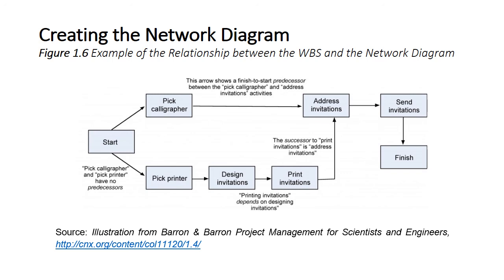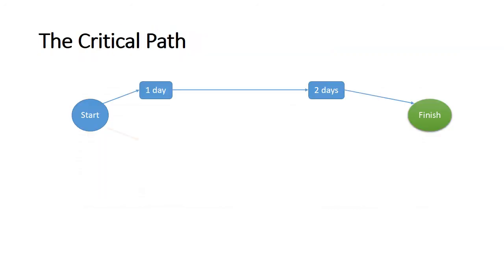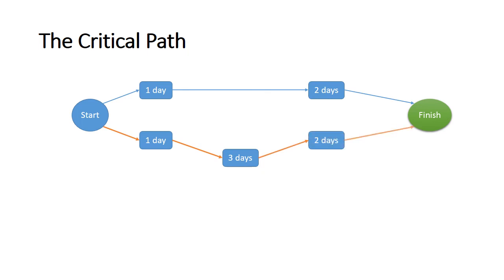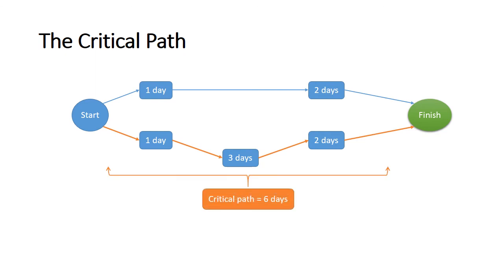The network diagram offers important information to the project team, such as how the tasks are related, where the risk points are in the schedule, how long it will take as currently planned to finish the project, and when each task needs to start and end. The critical path outlines the sequence of tasks that would enable the project to be completed in the shortest possible time, which is based on the idea that some tasks must be completed before others can begin. A critical path diagram is a useful tool for scheduling dependencies and controlling the flow of the project. In order to identify the critical path, the length of time that each task will take must be calculated.